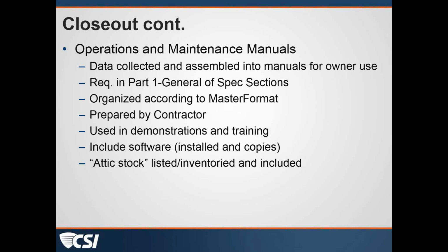All right, and then we have the second question here from Jim. He's asking, is it a legal option to have the as-built updates and the other submittals tie into monthly payments to the contractors? You are free to contract pretty much at will, provided that you're not trying to contract for something that is illegal. So tying payment to making sure that the record drawings are being maintained is allowable.